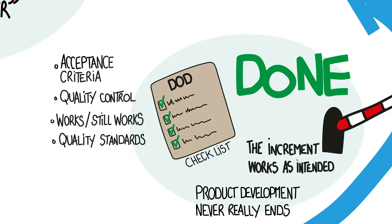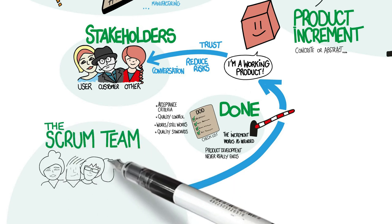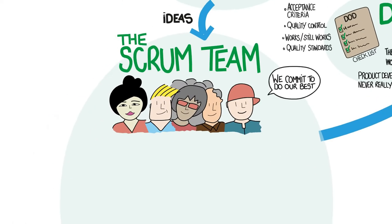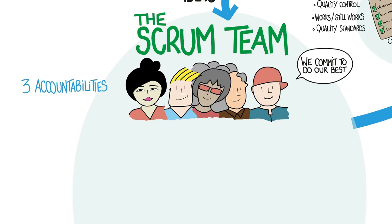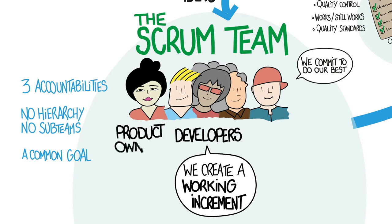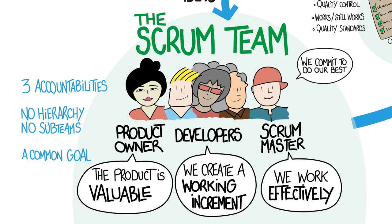The scrum team is accountable for creating a valuable, working product increment every sprint. Ideas come into the team, the product owner sequences them, and the scrum team commits to do its best to turn the most valuable of those ideas into a working solution by the end of the sprint. Accountability defines each member's contribution to the overall result. Scrum forbids hierarchies or sub-teams within the scrum team — there is one team working towards a common goal. The scrum team consists of developers, a product owner, and a scrum master.